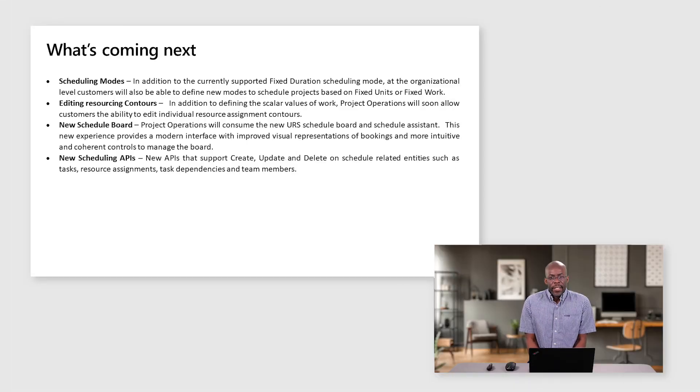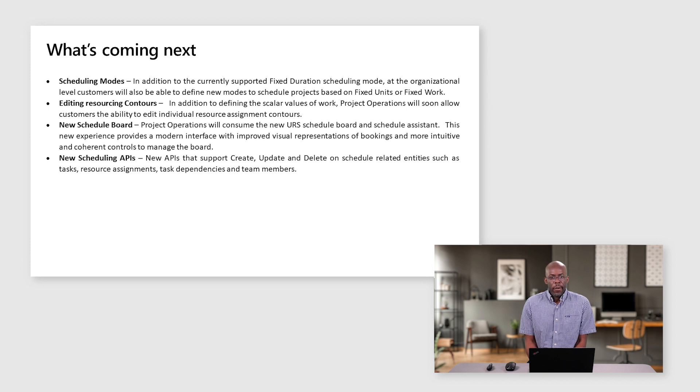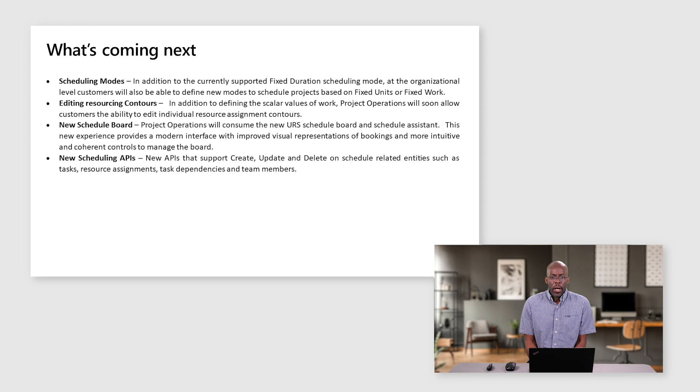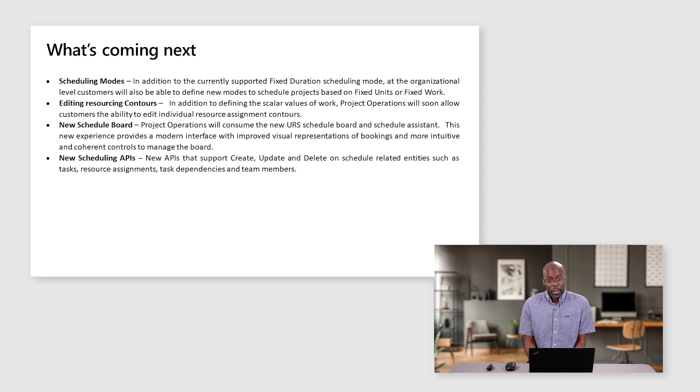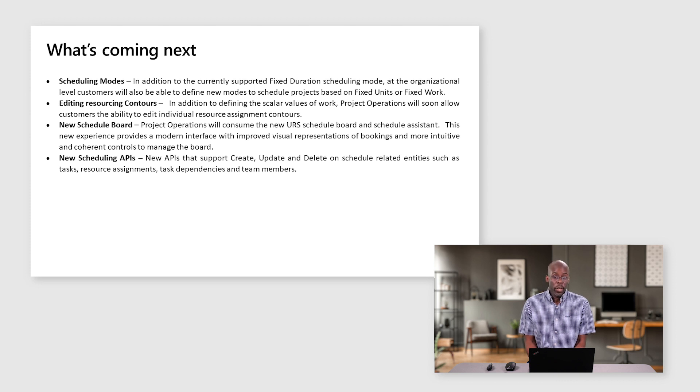We are very excited to share some new investments upcoming in the next wave. First off is schedule modes. In addition to the currently supported fixed duration scheduling mode, at the organizational level, customers will also have the ability to choose whether or not they want to schedule based upon fixed units or fixed work.